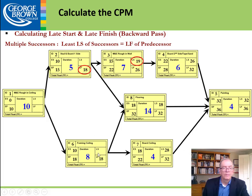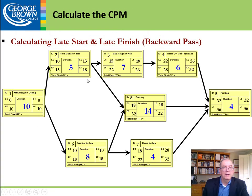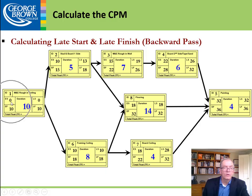Continuing: of the numbers 10 and 13, we take 10 — the smaller — as the late finish. Then 10 minus 10 equals zero. The final late start must equal zero; if it doesn't, you started with zero and something went wrong somewhere.